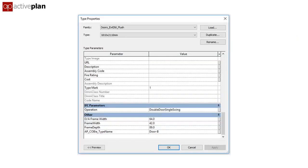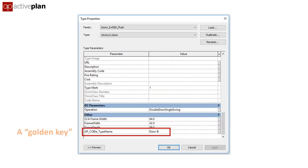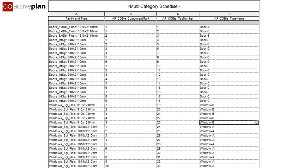This key goes into the Revit family and into each instance in the model. The door schedule includes the golden key in column D, as defined in the AIR.